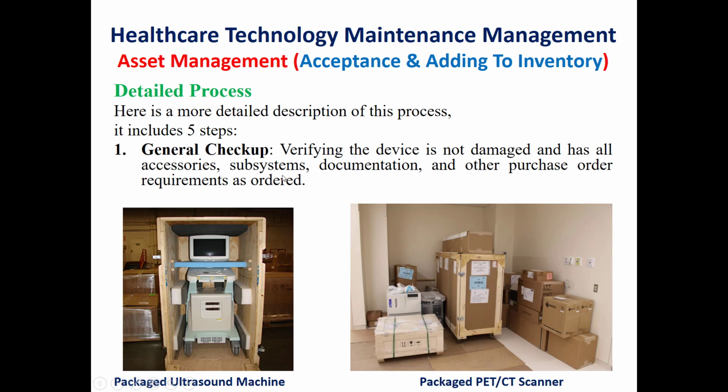Sometimes due to improper transporting of the medical device or improper packaging, this would lead to damage of this medical device or system. So verification that this device is not damaged is essential, and also a check of the requirements in the purchase order should be made before the signing of the delivery order.